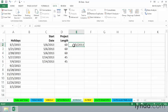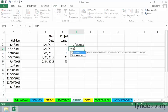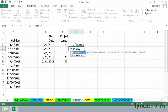But let's say we don't work weekends, so we'll use the function called WORKDAY. And I'll first use it in its standard way. Notice that its companion is called WORKDAY International. So WORKDAY simply uses standard American-type, English-type weekends, left parenthesis here.